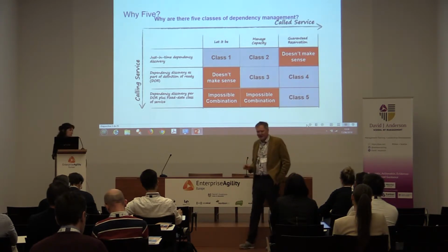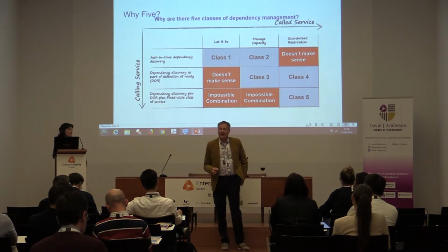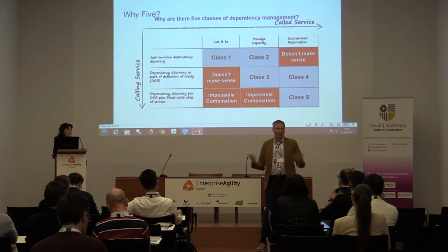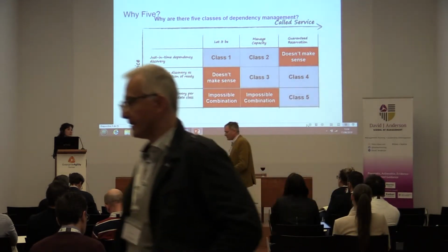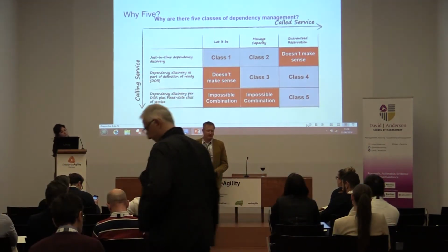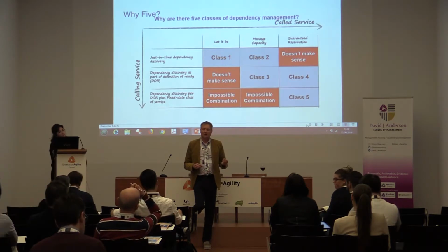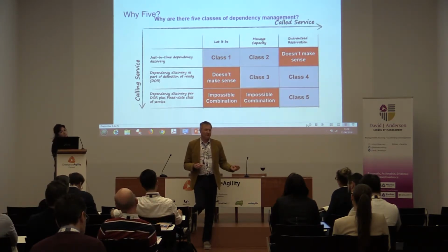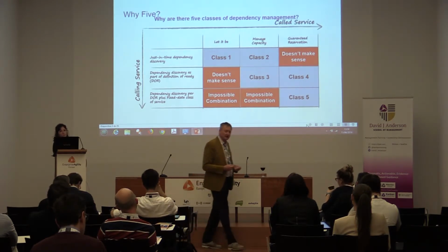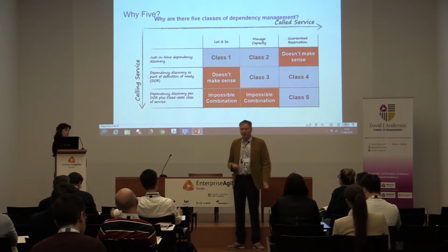Well, if something isn't that urgent, do you care whether it has a dependency or not? No, you do not. Why would you bother flying a whole bunch of people to Frankfurt to find out whether it did? Complete waste of time. So, in other words, whether you care about dependency management depends on the risks that you're trying to manage and primarily the cost of delay, the urgency of the item.